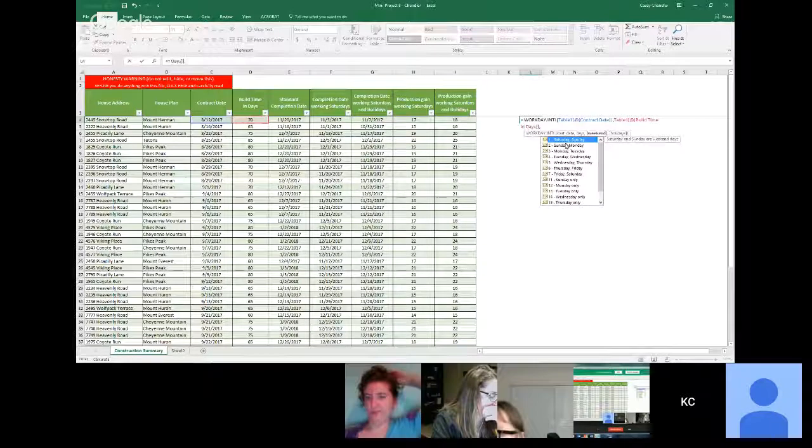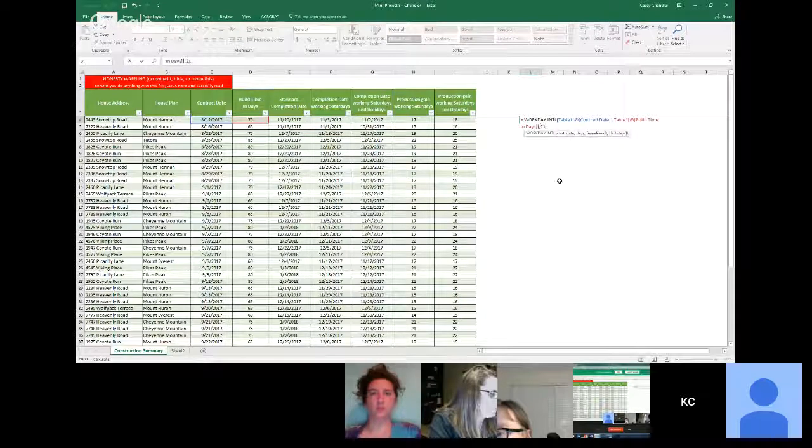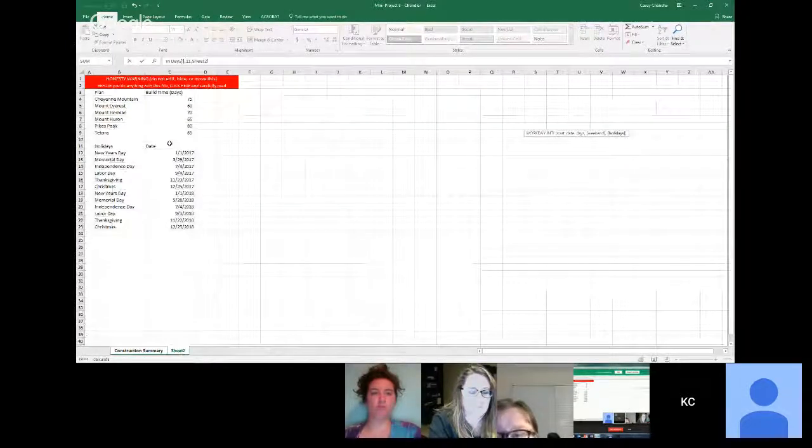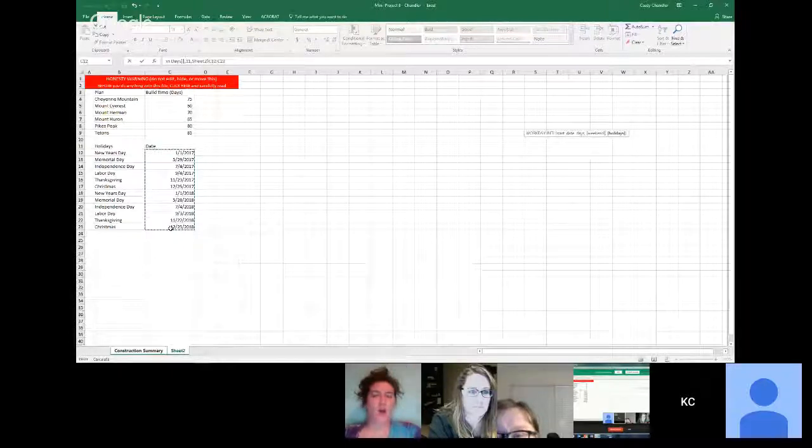Now it's asking me, what is my weekend? In this case, the only weekend day that I'm going to have is going to be Sunday, because I'm working Saturdays, right? So I'm going to come down here to number 11 and say Sunday only. And I'm going to click that. And I hit comma. Now it's going to ask for holidays. Well, they won't be working holidays for this particular equation. So to determine that, all you have to do is come into your information and select that data set right there, close it out, and it's done.